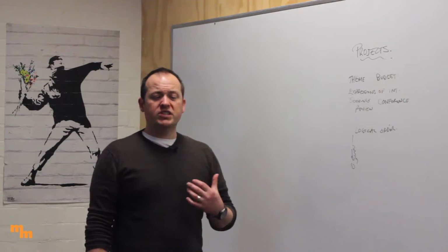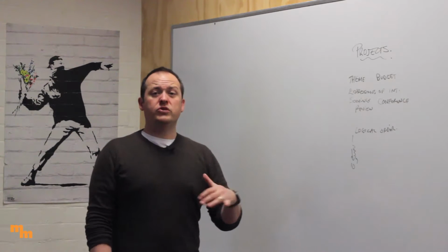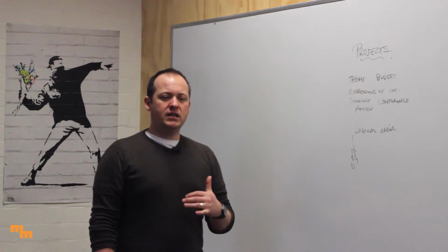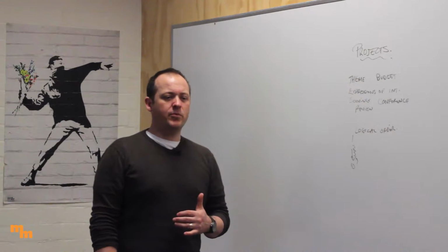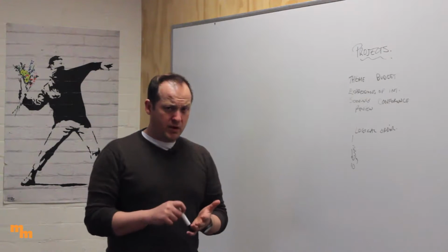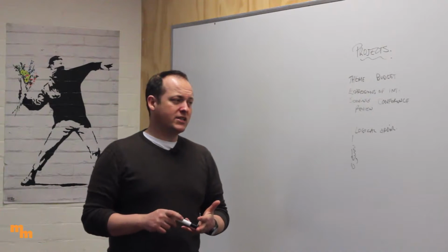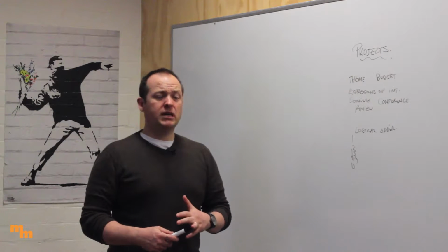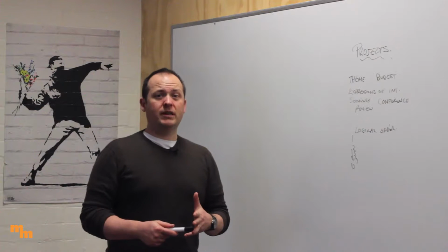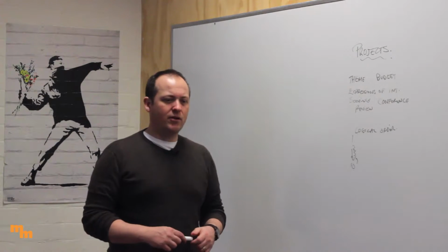All right, now the next thing I need to do is set my responsibilities. So once I've agreed to the sequence, I need to say, well, who's actually going to be doing those activities in my work breakdown structure? And obviously I need to think about who's the most experienced, who's the most capable, and who's the most committed. I need them experienced, capable of doing the task, and committed to doing the task. Because if they're experienced and capable but don't really care, they might not do it. If they're inexperienced and incapable but really keen, they still can't do it. So I need them to actually have the whole thing.